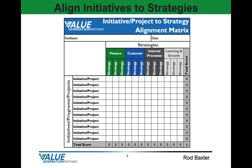This is the template we'll use to align our initiatives with our strategic goals. First, we'll list the strategic goals and objectives by category — financial, customer, internal process, and learning and growth — across the top horizontal axis.